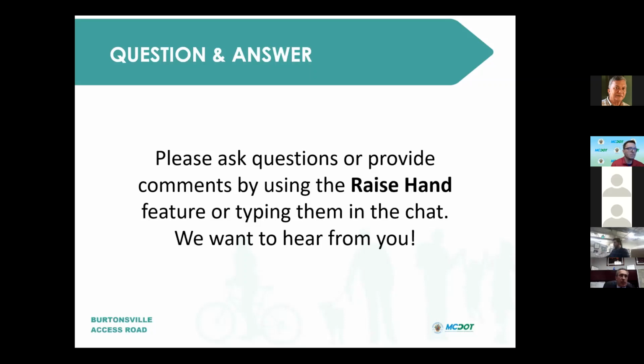We cannot. I didn't want to get into the nuts and bolts of it, but when we advertise a project, we put it up for bids, and it basically says what our project is. Because we don't know what you want done, for instance, in addition to milling and paving, you may want planters, lighting, or whatever else. We don't know, so that's not in the scope that we're advertising. And we cannot force the contractor to do that.